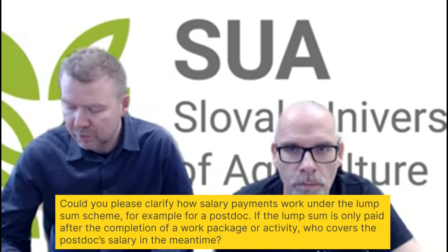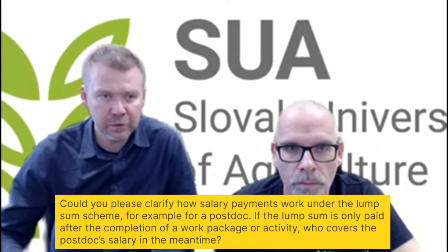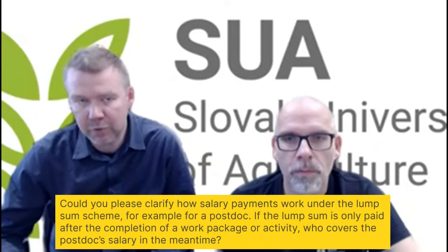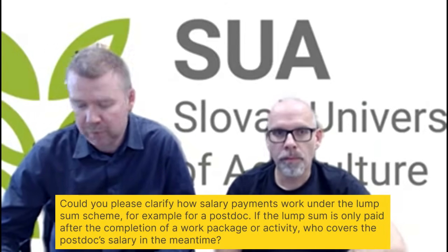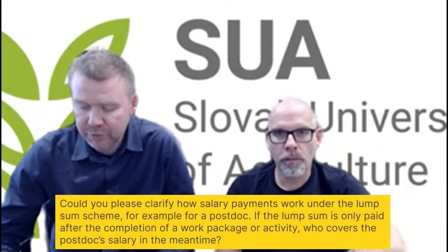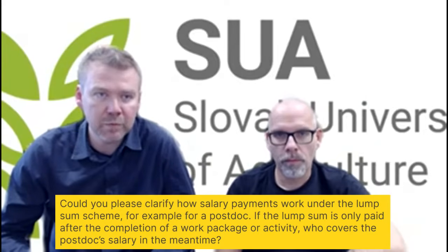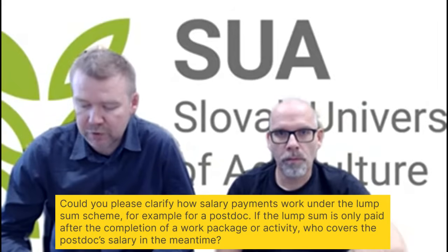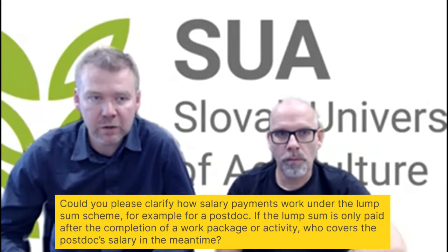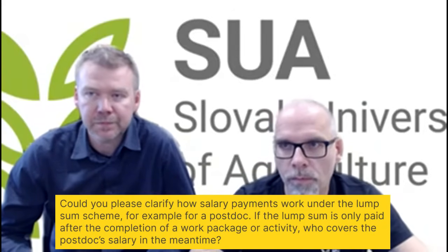It was provided on each partner's individual progress report. So we ask our partners to give us the report of all their activities, and based on this, we release the second part of the pre-financing. And then we have, of course, the payment of balance at the end of the project. So I think with the 75% of the pre-financing, in our case, it was totally okay to cover all our activities in the project. That's it. Thank you.